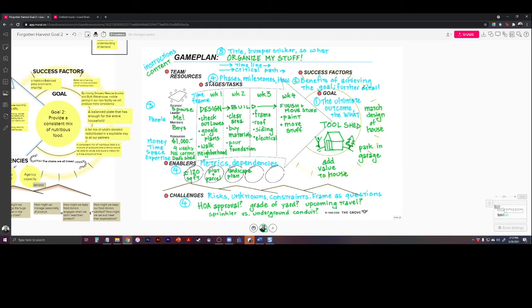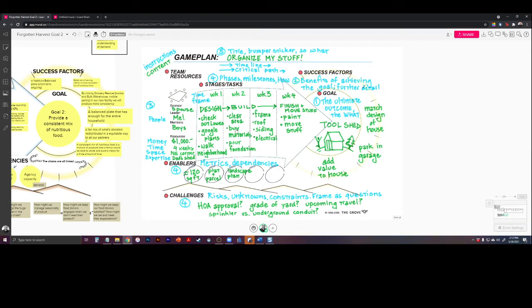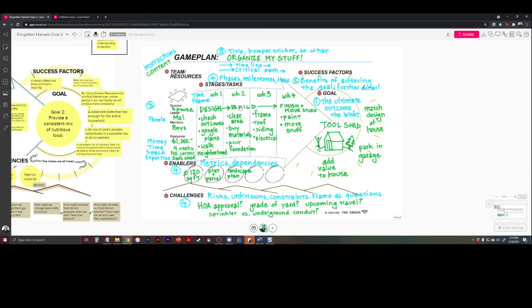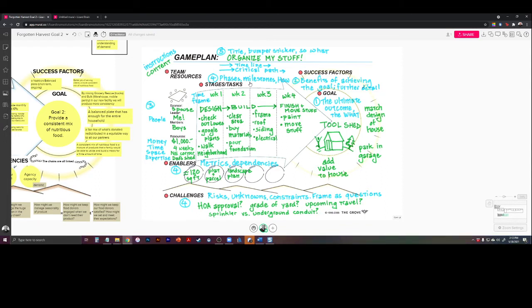Now, I like to have them do stages and tasks, enablers, and then challenges all at the same time, because it just is a natural part of the conversation. I'll walk through it linearly just for the sake of explanation. But let's say I'm going to divide up this project into four weeks. Week one is going to be design, weeks two and three are going to be build, and week four is going to be finish and move my stuff. So that's stages tasks - you can think of those as the phases, the milestones, how you actually do these things.